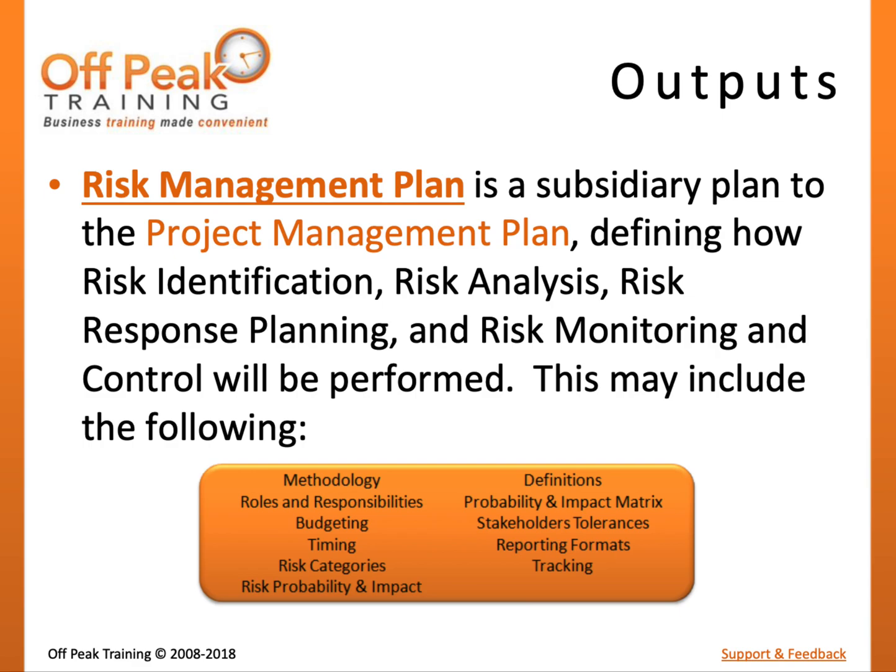The budgeting and timing of managing risk may include budgeted contingency and management reserves, and the planned iteration of repeating the risk processes. A set of definitions that the team will use to ensure they are sharing the same meaning for risk vocabulary. This can be important as team members can often get confused by the many terms that exist in the domain of risk management.